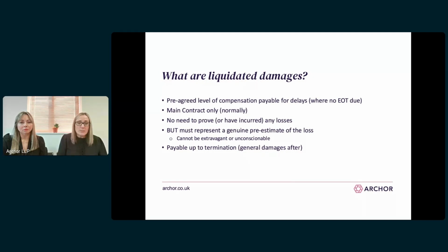Liquidated damages can only be deducted where the works have not been completed by the completion date. And it's important to note at this point that if the contractor is entitled to an EOT and that EOT is granted, the completion date moves. Sorry, liquidated damages aren't payable for a period where the extension of time is granted. They're only payable for a period thereafter, so past the date of completion.